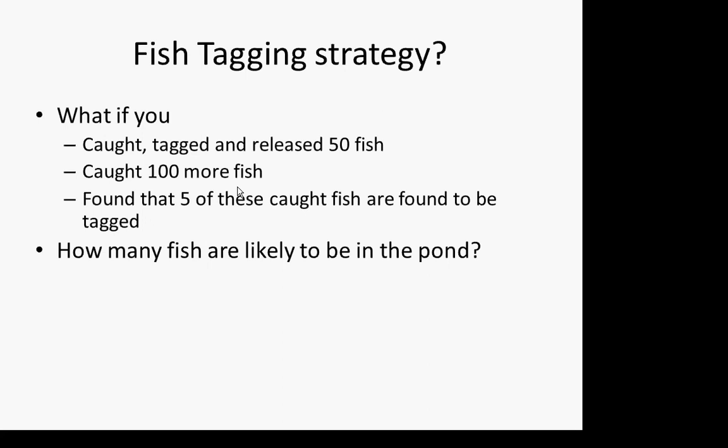So we might say, well, if these 100 fish included 10% of those we tagged, and if those we tagged are kind of representative of fish in general, maybe these 100 represent 10% of the whole lake's population. Assuming there's nothing about our trawling which is giving us the same type of fish. If we're getting 10% of the tagged fish in these 5 fish, maybe these 100 are 10% of all fish, right? In which case, 100 is 10% of 1,000.